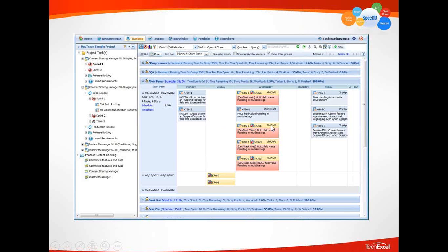Obviously, there is the time spent and time remaining, for example time spent 4 hours, time remaining 0 hours. The time remaining of each task represents how the team members are driving themselves to finish the task, based on their estimate, oh, for this development task, I can finish it in about 1 day. We want the team members to drive themselves to finish the task within, hopefully, the estimated time as a target. So that's the sprint workload.